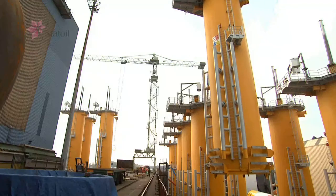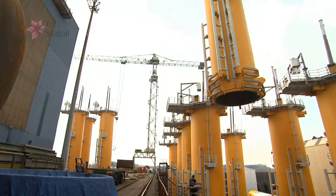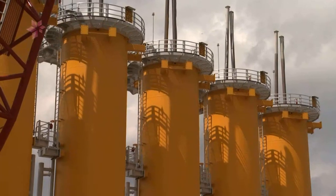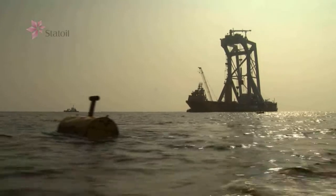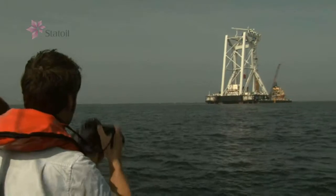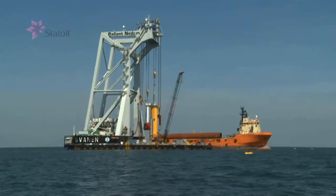The offshore work on the Sheringham Shoal wind farm is now underway, and the first foundations are installed off the North Norfolk coast, having arrived on the ship Toyser Sonata from the port of Vlissingen in the Netherlands. A heavy-duty floating crane will continue driving each of the 90 foundations deep into the seabed on site, ready for the installation of the 2 substations and 88 wind turbines in 2011.